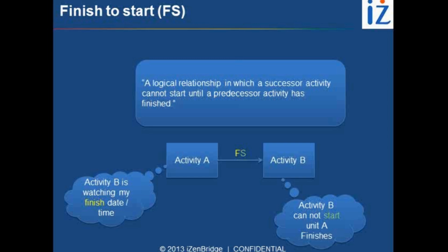In PMBOK language, it is defined as a logical relationship in which a successor activity cannot start until a predecessor activity has finished. FS. Till the time activity A finishes, activity B cannot start. So activity B is watching the finishing of activity A.